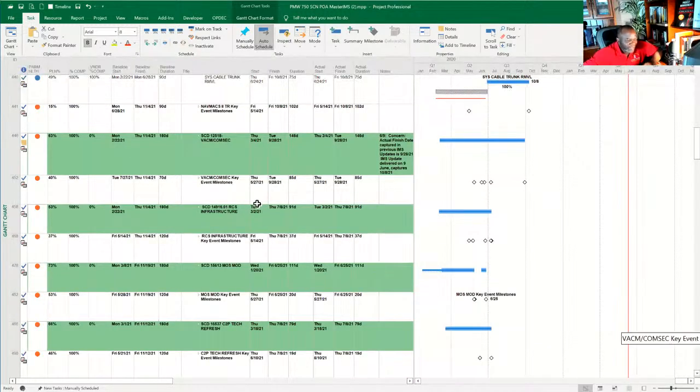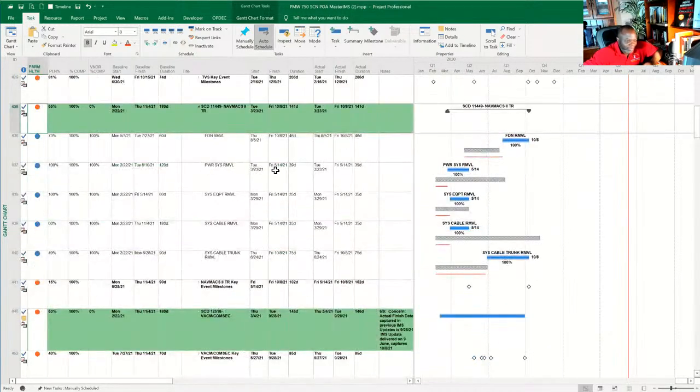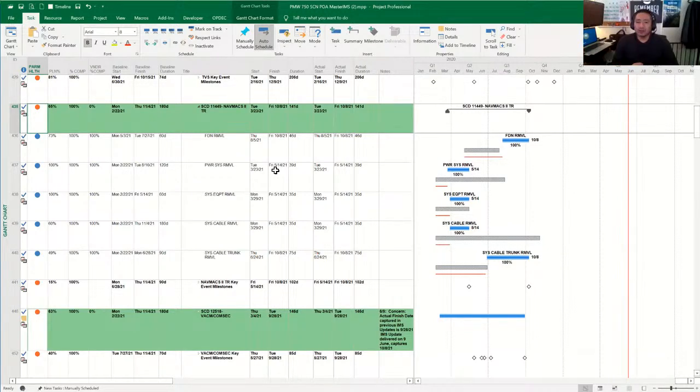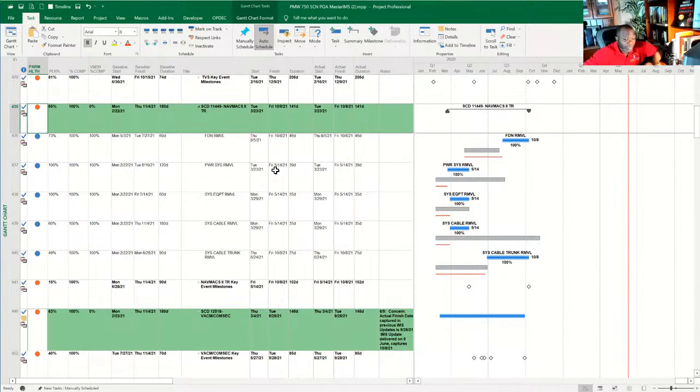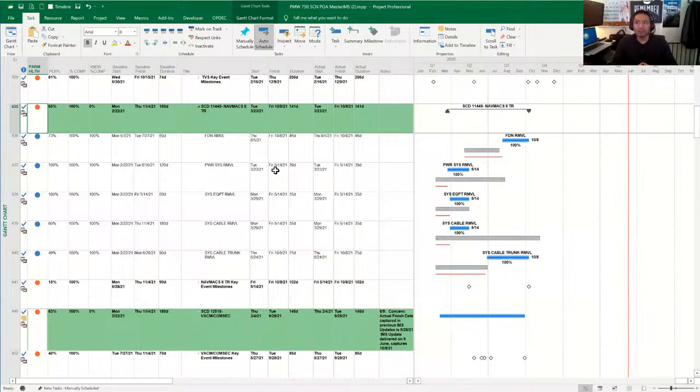And is that a field that you would add to show it, or would it just be a configuration of the Gantt chart? It's a custom field where we can add formulas to target your critical, your total, and your free float. And it's mainly used in that capacity so that if you have no float or no option to use float, you're able to show that you don't have any more float.